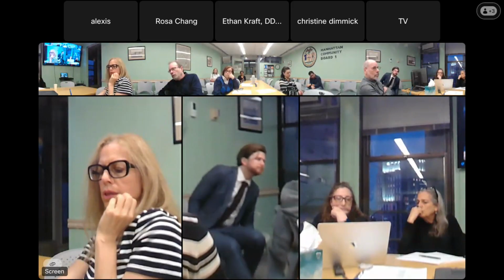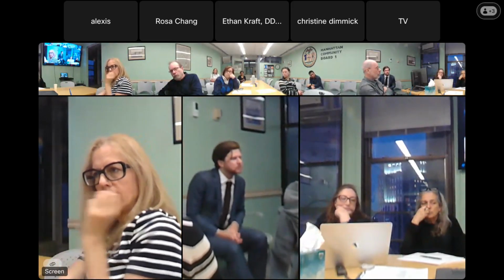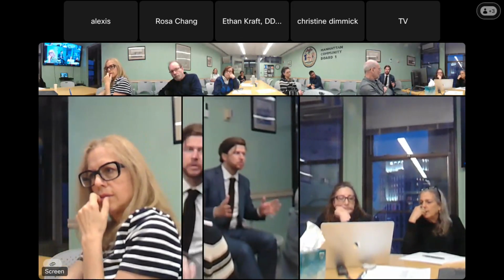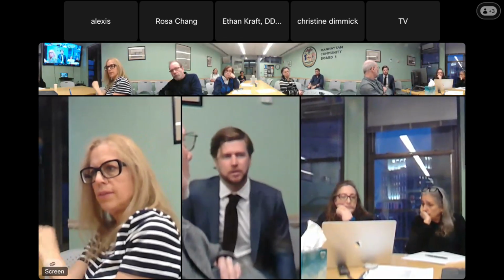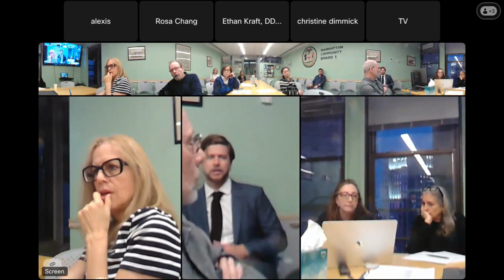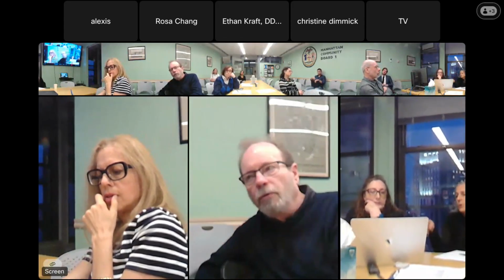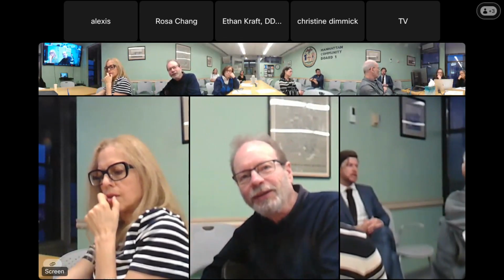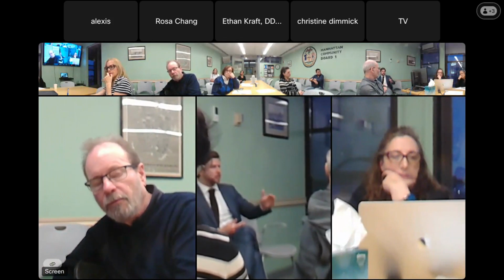So the 8 million for design, did you have that and they clawed it back, or you never had it? We never had it. All these grants are reimbursable. So you spend the money and then you hope they reimburse. Correct. And at what point in time would that reimbursement request normally go out, so we'll know yes or no whether you're getting the money? It usually is monthly, as the project proceeds.